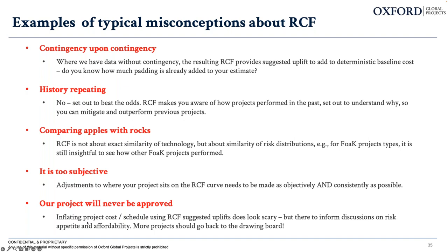Another one we hear often is, well, our project will never be approved if we present this to investors or other key stakeholders. Inflating the project cost, or indeed the schedule time, using the suggested RCF uplift can look very scary compared to the QRA. But it's important to also remember that the RCF is not a standalone tool. This is to be used in conjunction with other tools, and it is there to inform the discussion on risk appetite and project affordability. So this is very much a should cost discussion and a could cost discussion.